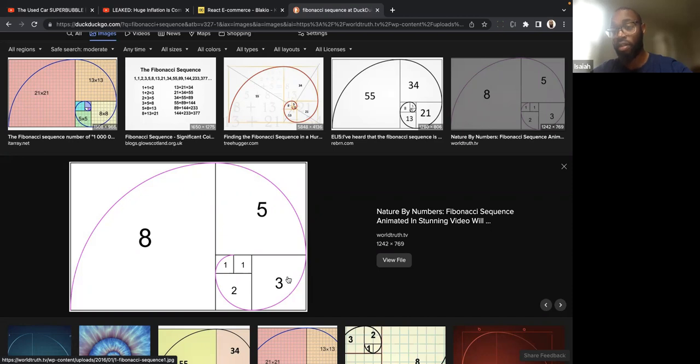Now, 2 days, potentially 3 days can be this three level of complexity. Anything five may take 3 or 4 days to complete.